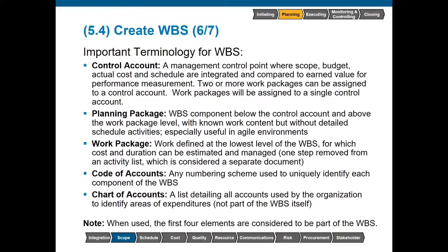So some terminology, and I will really stress the terminology here because this really does become a make or break type of situation for the exam. Some of these terms sound very similar, but they cannot be used interchangeably. So a control account, this is a point that we establish on the WBS. Now, we define where the control accounts go as part of our cost management plan. These control accounts, we have to have at least one, and if we only have one, it's going to be at the very top because every work package has to be assigned to a control account. We can have as many control accounts as we want, but we want to go ahead and keep it as organized as possible.